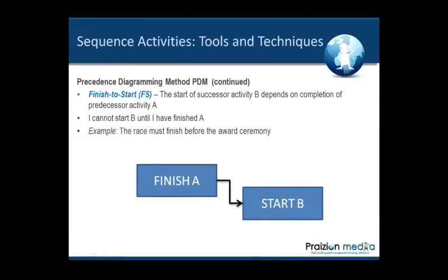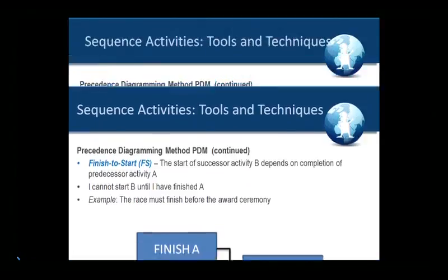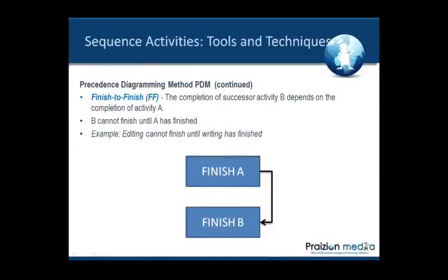So finish to start. An example of finish to start is, I cannot start B until I have finished A. The race must finish before the award ceremony. An example of finish to finish, B cannot finish until A has finished. Editing cannot finish until writing has finished.